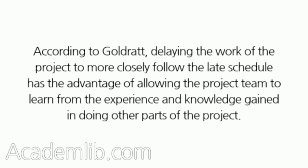According to Goldratt, delaying the work of the project to more closely follow the late schedule has the advantage of allowing the project team to learn from the experience and knowledge gained in doing other parts of the project.